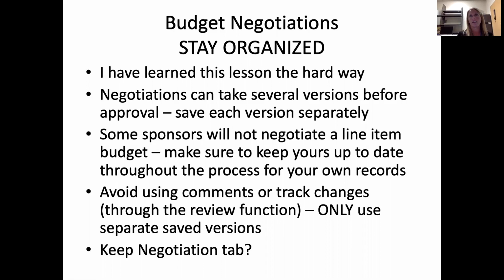So you make your budget, and then at the end of the day, maybe the sponsor's just looking at the per visit cost, and then the total cost for a participant, and that's okay. Because then if you work with that sponsor in the future and there's twice as much work for a new project, you have some justification to increase budgets and say, well, on this other project you only had these visits, and the cost per visit or the cost per participant were this, and now you have additional procedures, and so the budget should go up. So it will come in handy later on, and it'll help keep you organized also.